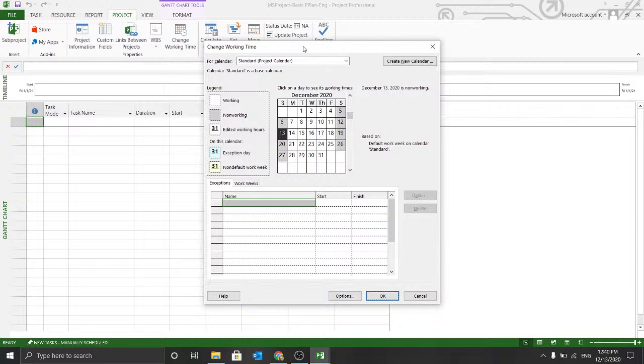So you can adjust your working days based on your region, based on your areas, and also you can then define your public holidays as per your given region, so that those are taken into account while scheduling the project. Over here, let's say I define some exceptions in the project.